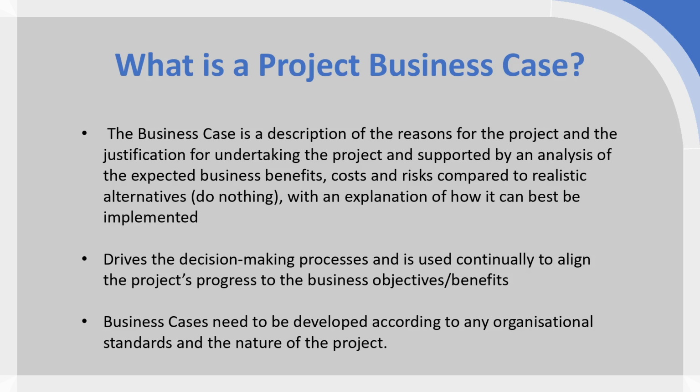Well, if you're keeping your business case live, so you're treating it like a live document, it's kept constantly updated, you'll be able to identify at what point the justification for that project vanishes, and it'd be better off to either cancel the project or roll it back or amend the scope. So it's not just something to approve a project or get a project greenlit. It's also there as a live document which should be continually updated.